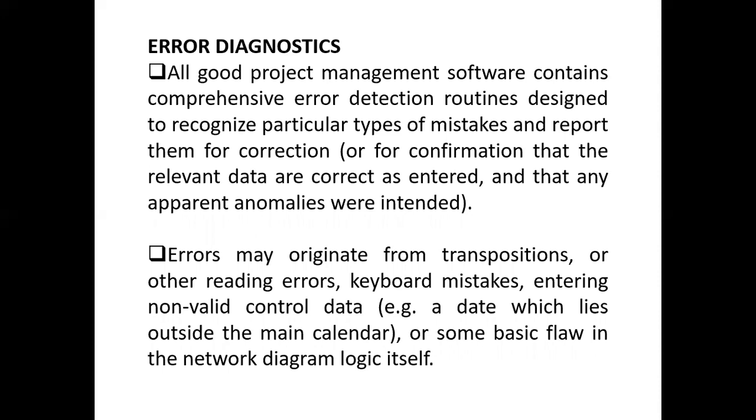Errors may originate from transposition or other reading errors, keyboard mistakes, or entering non-valid control data, probably a date which lies outside the main calendar, or some basic flaw in the network diagram logic itself.